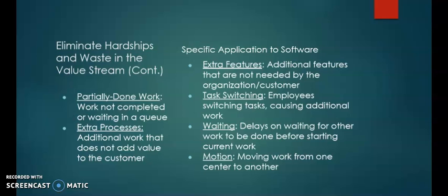Okay, so the specific applications to software in the wastes are extra features that are not needed by the customer; task switching, so employees doing too many different things at the same time, so they lose focus, causing additional work; and waiting, which is waiting on others to finish their work before you can start the next step.